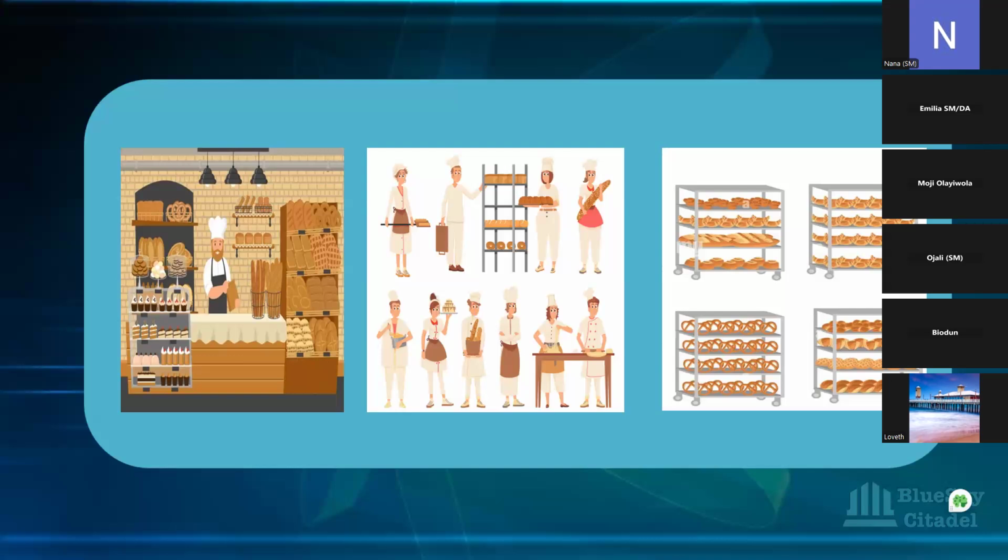And because of that, what we'll be working on might be less than what we normally work on. Now, that product owner also prepares the stakeholders to say that, oh, this is holiday time, people are not around, and all that. So maybe if you're expecting us to give you this, we might only be able to do priority. Maybe these two are the priority that we can work on. So the stakeholders' engagement, the stakeholders' expectations is well managed because you provided the product owner with that information.